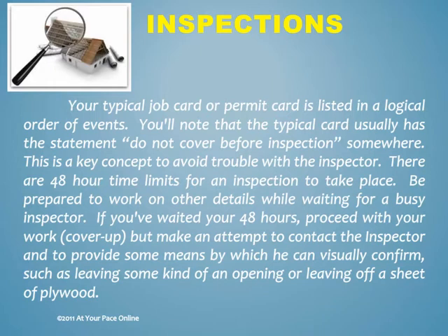Inspections. Your typical job card or permit card is listed in a logical order of events. You'll note that the typical card usually has the statement, "Do not cover before inspection," somewhere. This is a key concept to avoid trouble with the inspector.